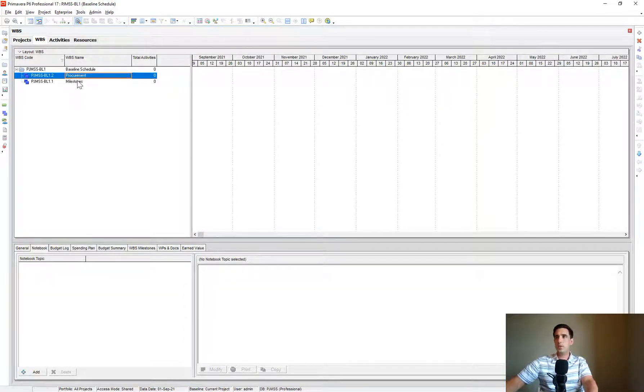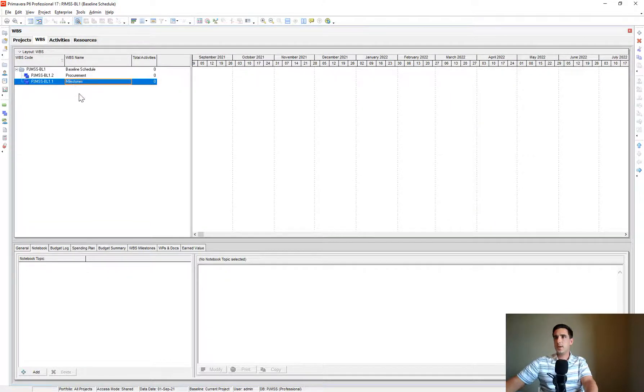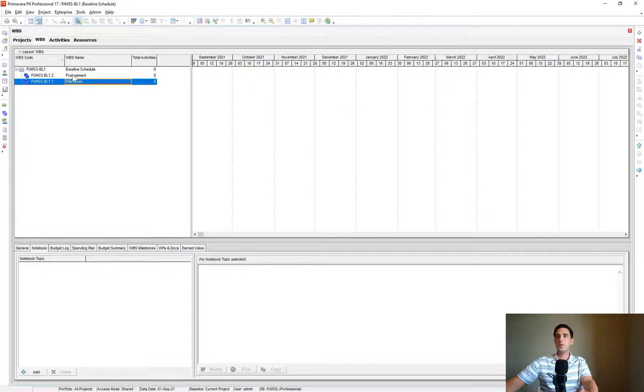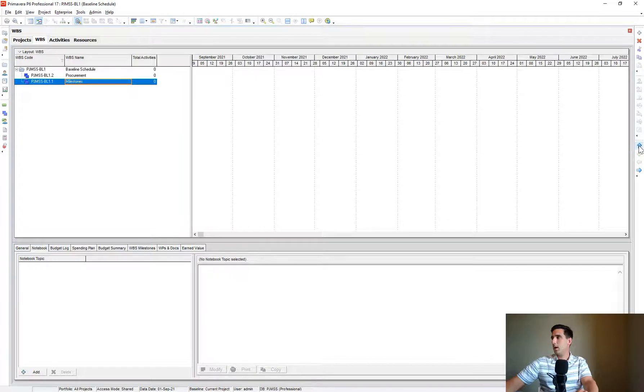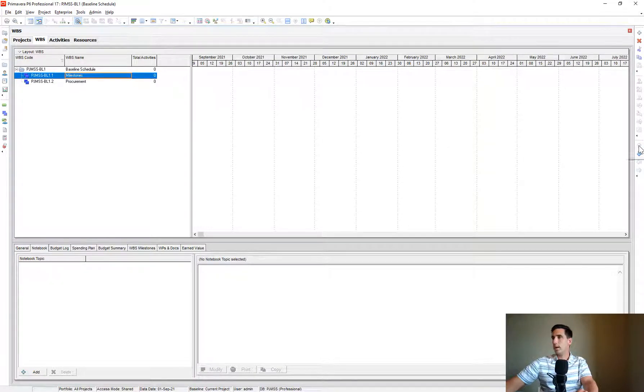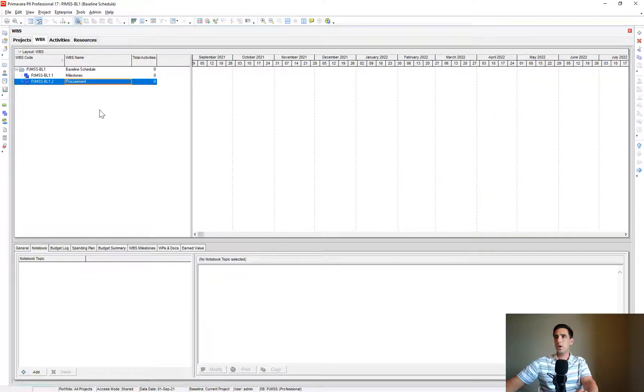Let's call this one Procurement. You'll notice the order of them. It goes Procurement first and then Milestones, which that's not how I want it. I want Milestones first and then Procurement. So I just click on Milestones and I use the up-down toggle here and I toggle that up. Now I have Milestones and then Procurement.